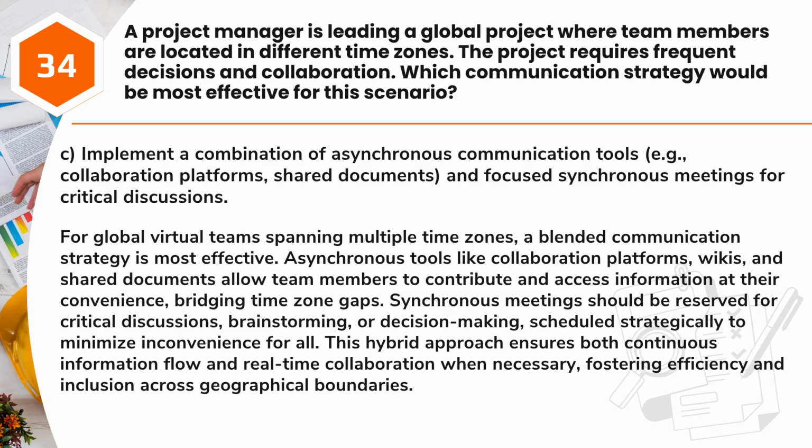Asynchronous tools like collaboration platforms, wikis, and shared documents allow team members to contribute and access information at their convenience, bridging time zone gaps. Synchronous meetings should be reserved for critical discussions, brainstorming, or decision-making, scheduled strategically to minimize inconvenience for all. This hybrid approach ensures both continuous information flow and real-time collaboration when necessary, fostering efficiency and inclusion across geographical boundaries.